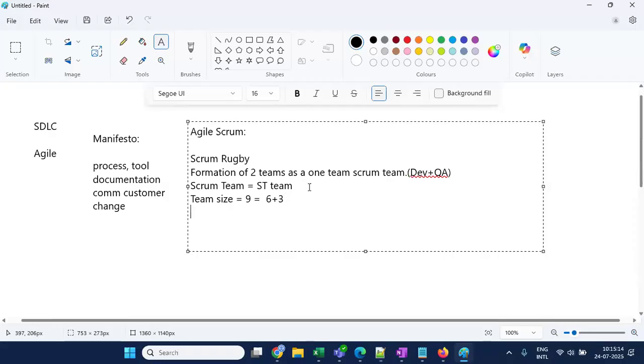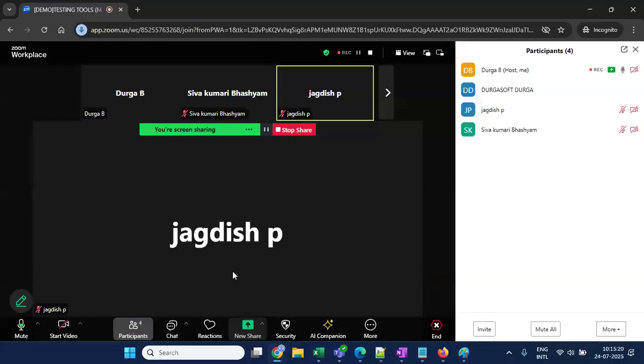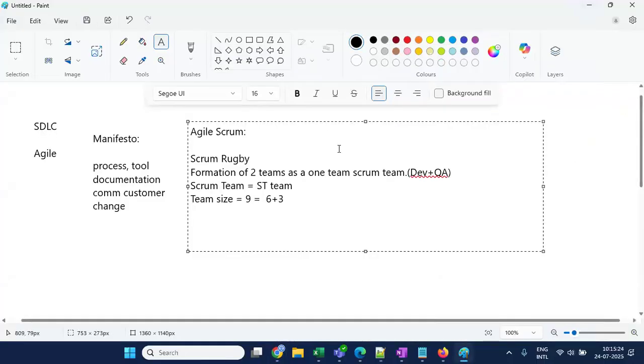So generally, how the QA and dev team size will be decided depends on the type of project and the complexity of the project we are working on. For all commercial applications like shopping sites, healthcare, or logistics, they will choose the ratio of 3:1, which means for 3 developers 1 tester is sufficient.